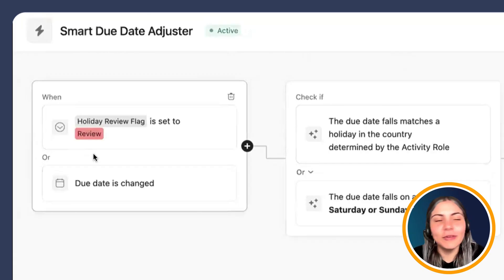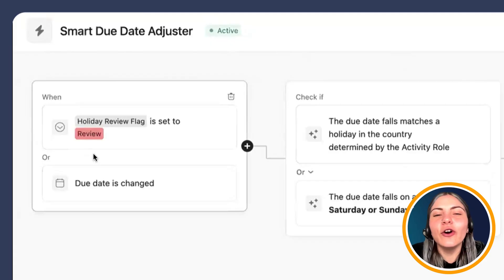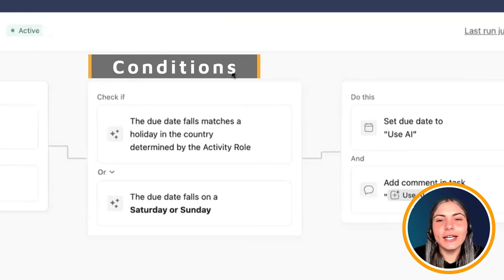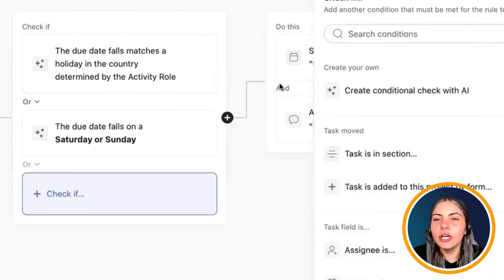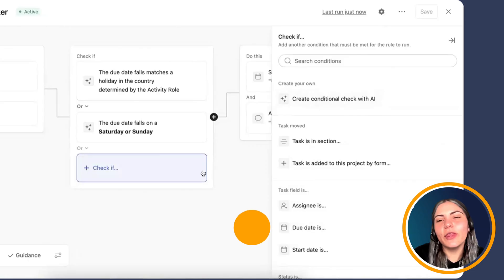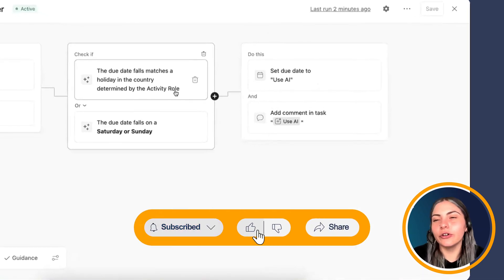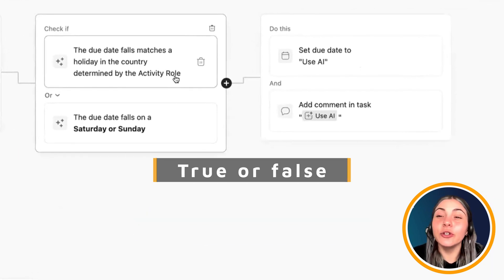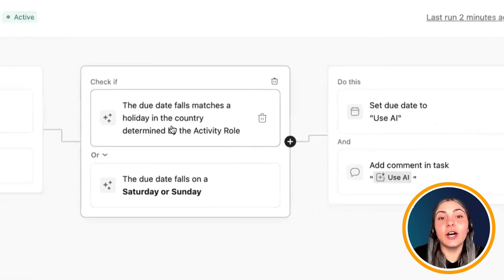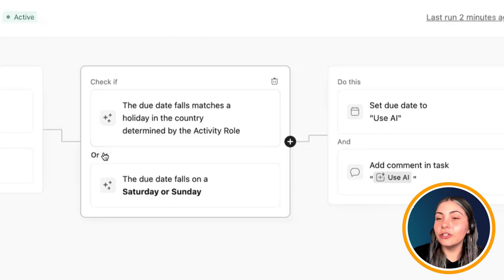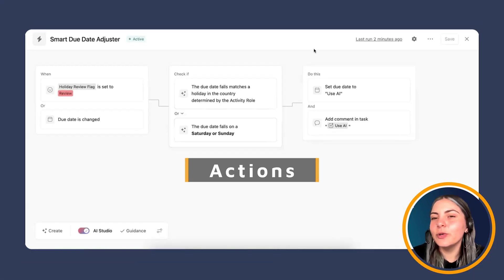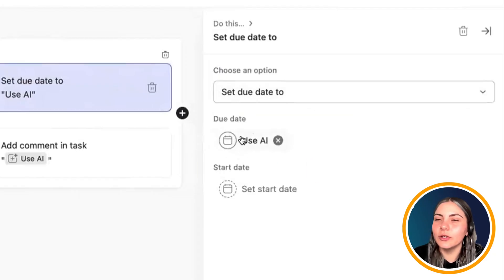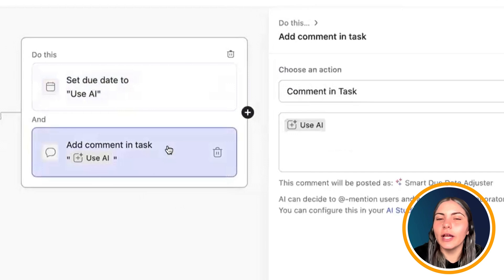We add the due date trigger because project schedules do change. We want to ensure that if a due date is changed in the future, the rule also checks that the new date doesn't fall on a holiday or weekend. For our conditions, we're using an AI condition rather than standard Asana rule conditions. Asana will let you know if you can improve your conditions, since they should be true or false checks. We're checking: does the due date match a holiday in the country determined by the activity role? Or does it fall on a Saturday or Sunday? If so, we set the due date using AI and add a comment to the task.